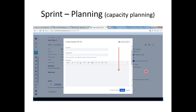Returning back to task creation. In this screen, I find there is no provision to estimate how many hours a particular subtask will take. If you scroll down, you don't see the hours section. This is because time tracking is not yet enabled — I will show how to resolve it. Using the time tracking fields, we will be able to plan time in hours or minutes for a particular piece of technical work.